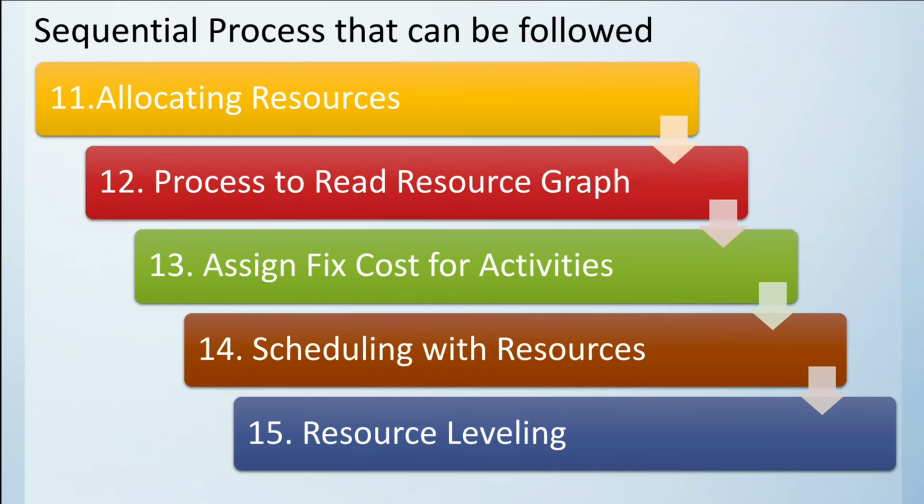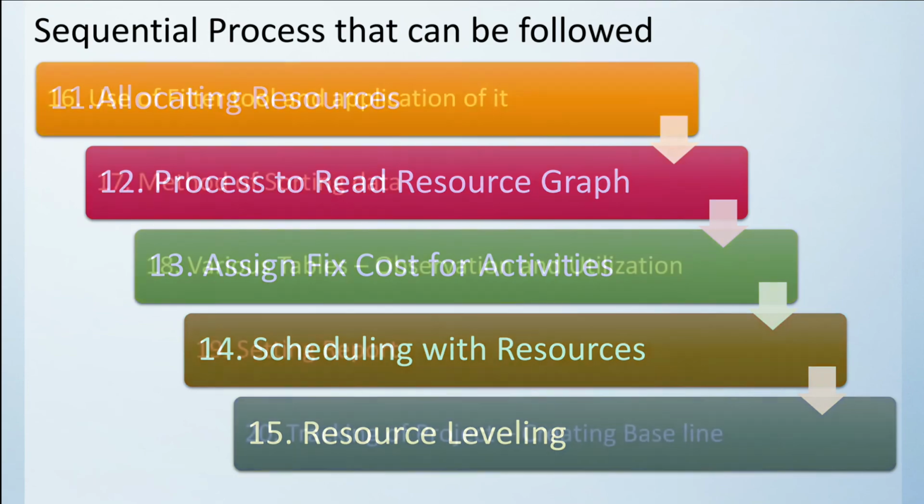We will schedule the resources. You may know the concept of resource leveling, which means that on a particular day the consumption of resource is minimum, whereas on certain days the resource consumption is maximum. So this process is to bring the maximum level of the resource down to the average level, so that a huge amount of money can be saved by balancing the activities in such a way that the resource consumption becomes around equal on each day.